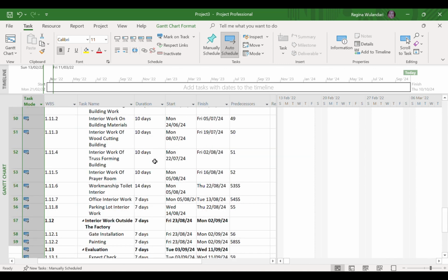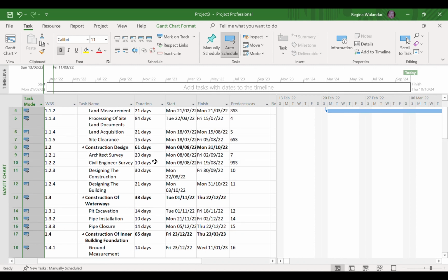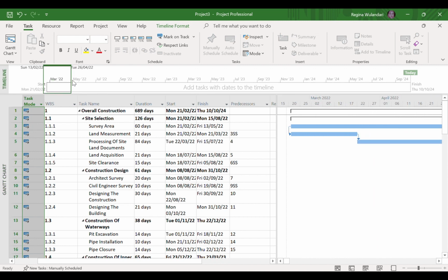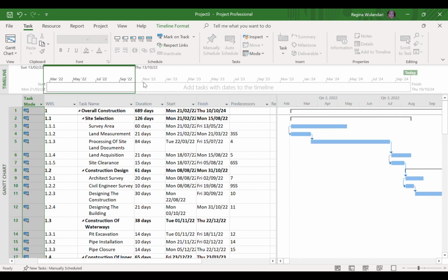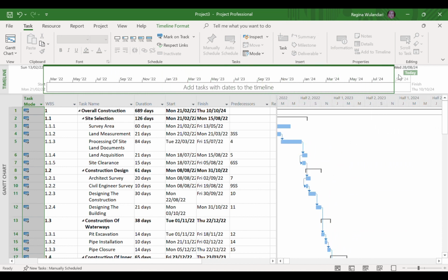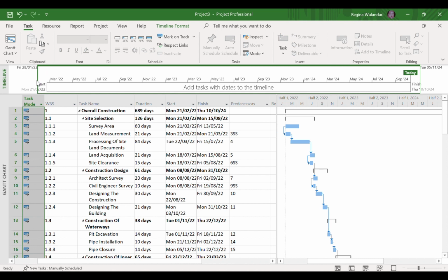Milestone is a part of a work item that is made as if it's a temporary finish or temporary completion of a series of work that is a part of a large schedule. Milestones are also important events that usually have no durations. Milestones are useful for making schedule goals and monitoring progress. One of the uses of milestone is monitoring and control. For example, before the overall construction stage, there is a start date that we make a milestone because it is an important part as a sign that this project is starting.